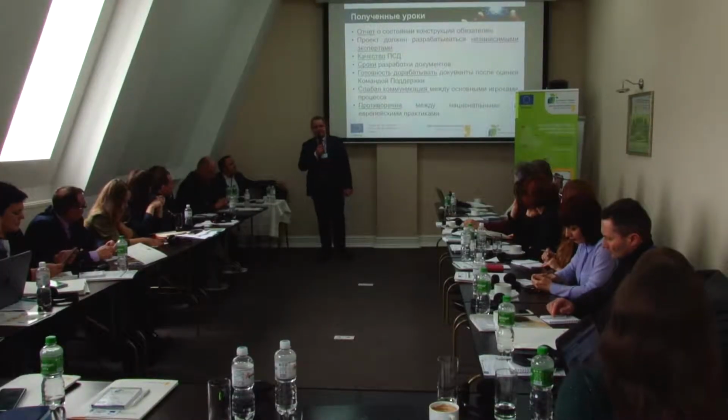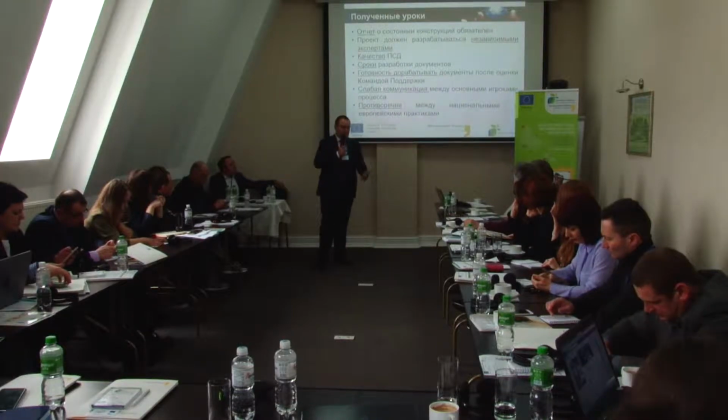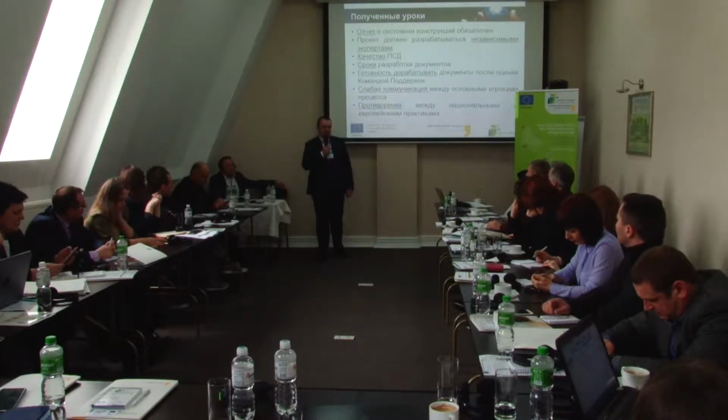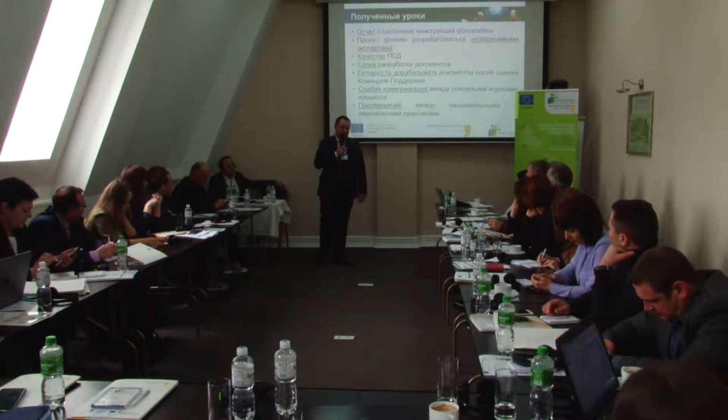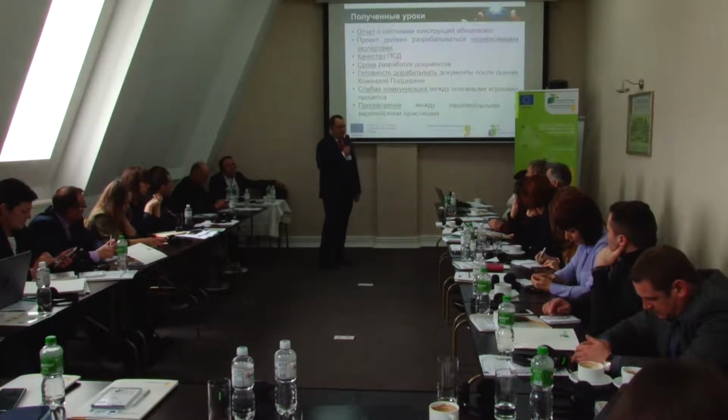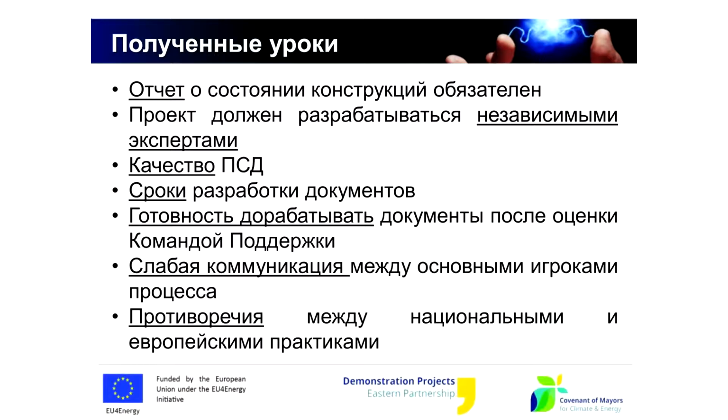Terms of documents preparation are the same as for the energy audit. I would like to give an example of Belarus. Instead of 3 months according to the contract, the developer was working on the technical design and bill of quantities for 9 months. It means the terms of fulfillment were exceeded 3 times.